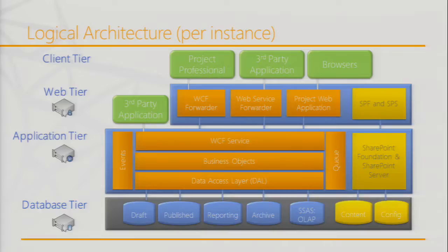And in the project server world, typically, we've got a lot of data, which is what we call time phased, which means we have numbers for Monday, Tuesday, Wednesday, and I want to be able to know how much capacity I've got this week, how much capacity I've got next month. Do I have enough DBA capacity in the month of January? Do I need to hire one of you as an SI because internally I've got a hiring freeze, but I know I need to deliver on all those SharePoint projects?